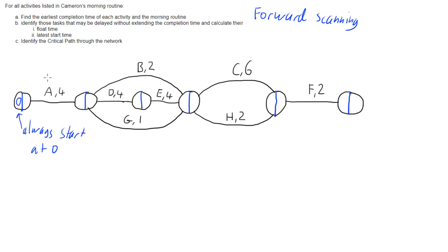Then we look at our next activity. Activity A takes four minutes to complete. We can't get to the next node until we have finished activity A, and it takes four minutes. We started at time zero, so we can't finish activity A until four minutes in. That means we can't start the following activities until four minutes in.